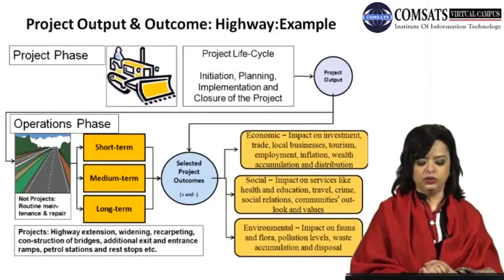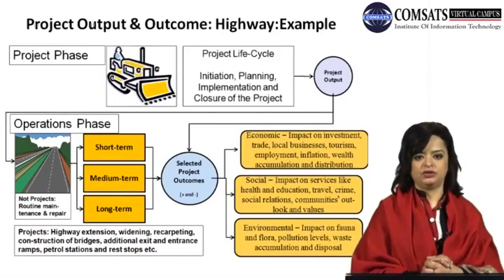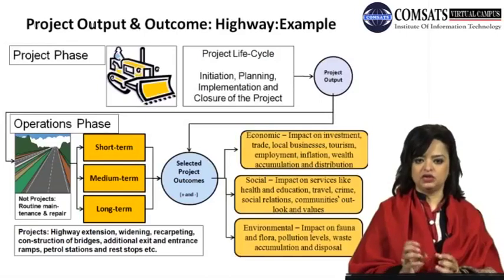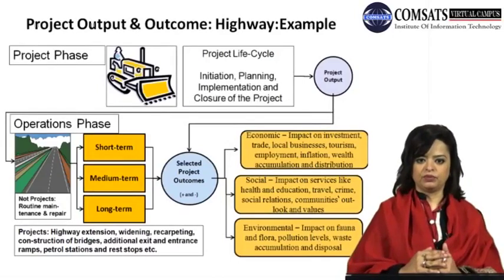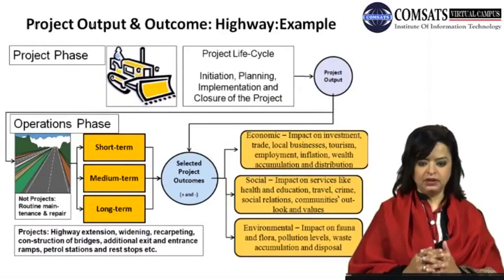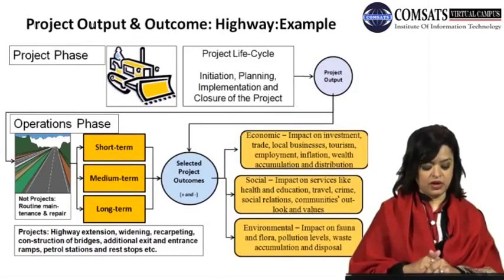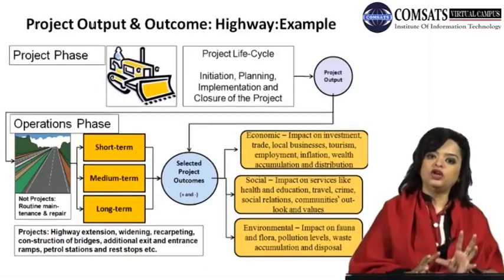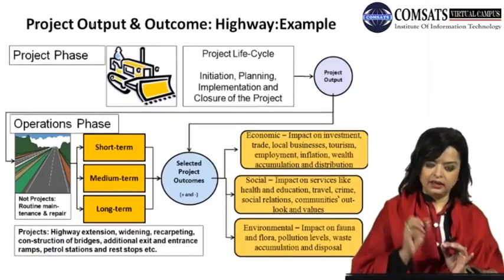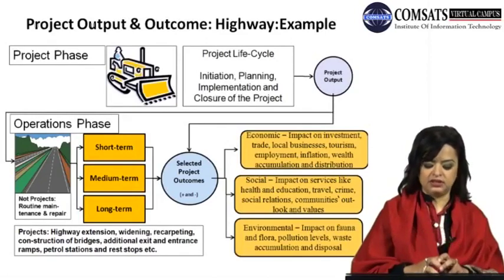Widening, now you're adding a total new lane to it. Or the recarpeting of it. If it's not considered part of regular maintenance of filling out the potholes, making sure there are no visible cracks on the road, the driving conditions are considered normal, then the recarpeting effort would be considered a new project. Construction of bridges, additional exit and entrance ramps, petrol stations and rest stops could be considered projects. The not projects are, again reiterating, the routine maintenance and repair.